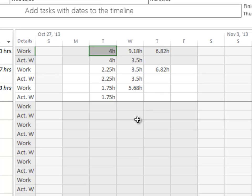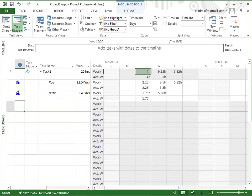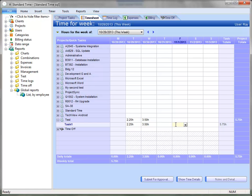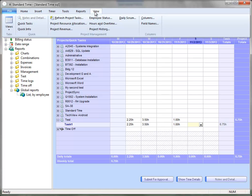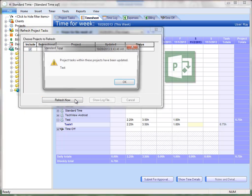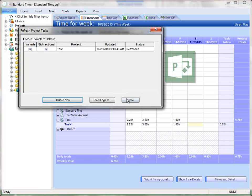So let's go over to Standard Time and do one little thing. So what I'm going to do is put some hours into one of these columns so that you can see that there's some new hours that have been added to the project. So let's switch back over to Standard Time and let's add one hour to Friday. Let's type in one hour. I'm going to go to the View menu, choose Refresh Project Tasks, choose Refresh Now. And so those hours have been sent over to Microsoft Project.